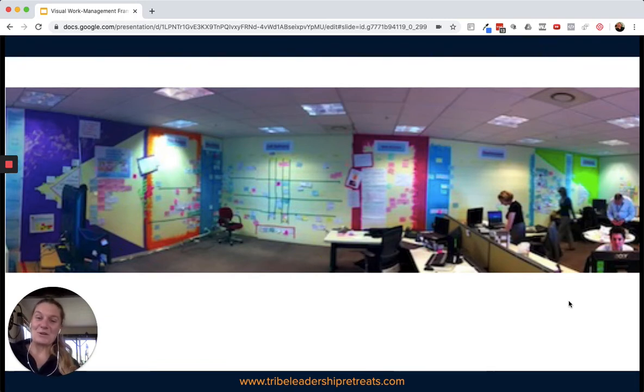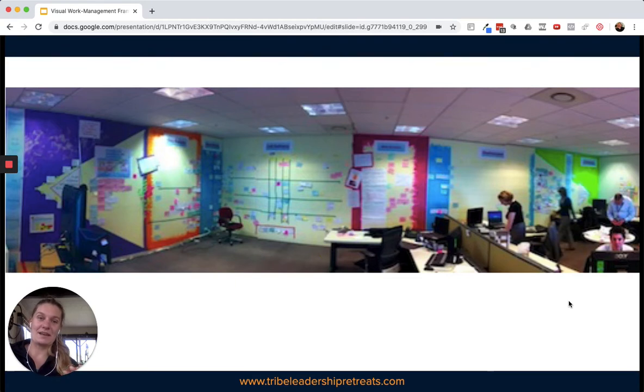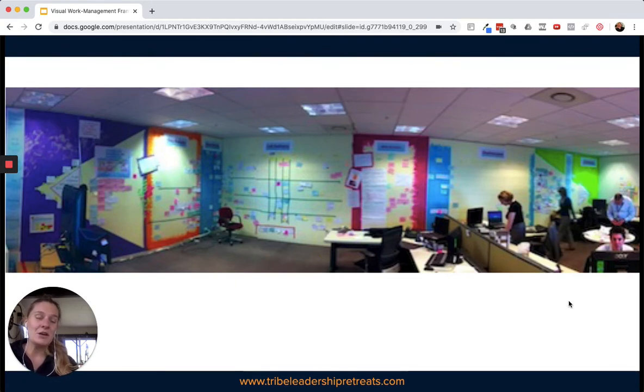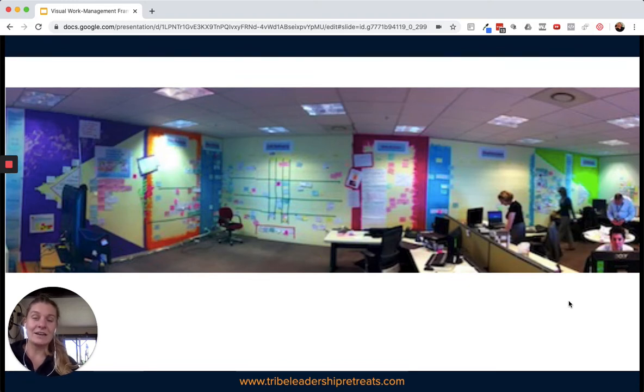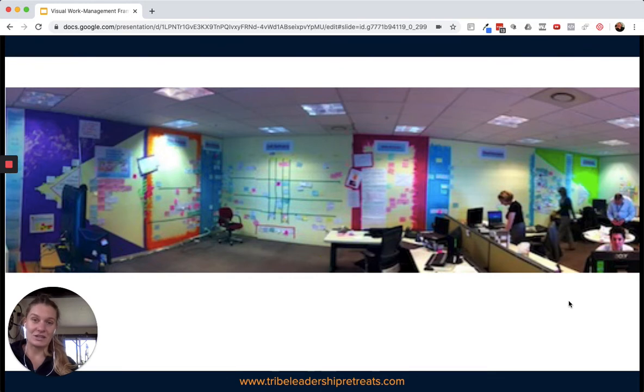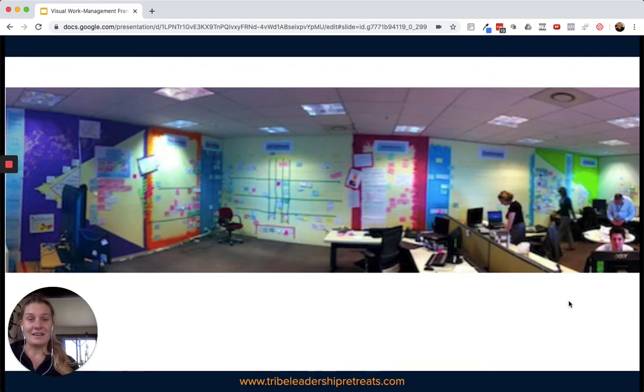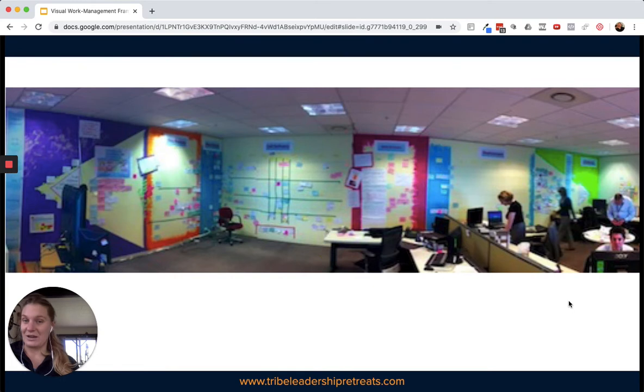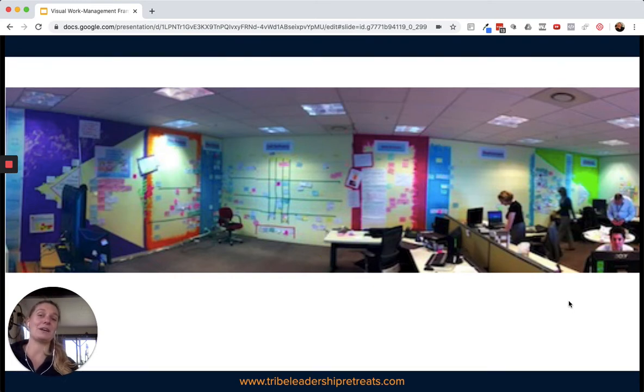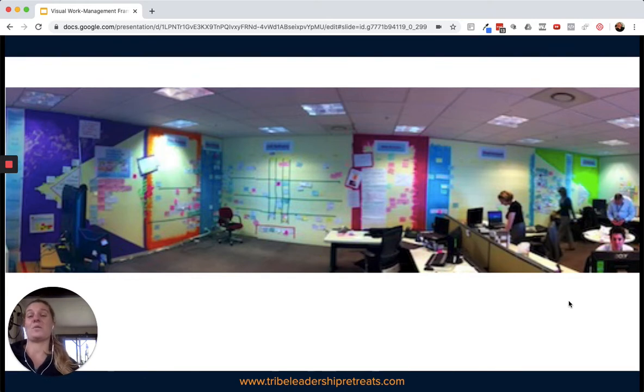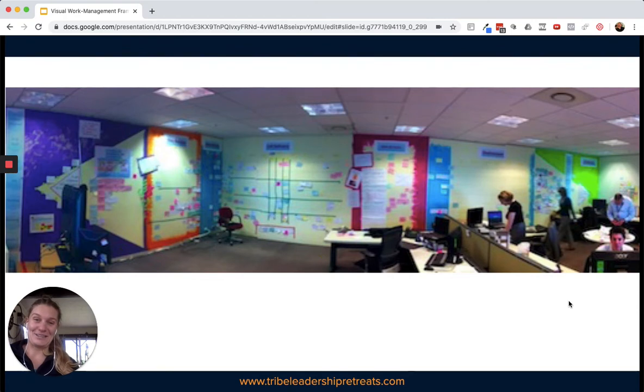What you're looking at is two really big open walls that we used to run this entire program. By the end of it, we were spending around $100 million a year on this program. It was a team of software engineers building software for call centers. This is the tool we used to run that entire program. We didn't do schedule updates, risks and issues registers, or tracking and reporting. Every chance we got, we brought people to the wall and talked them through the story.